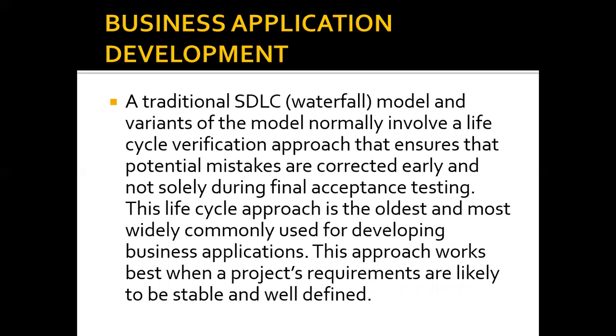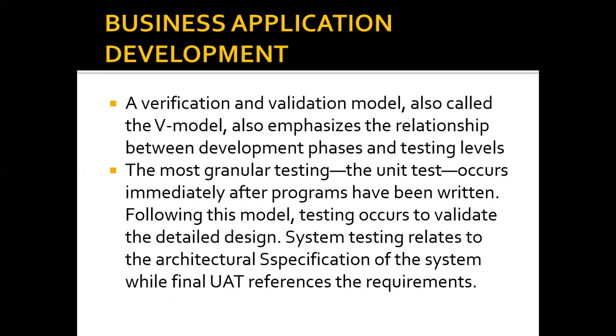All right, so the waterfall model basically is just like the normal waterfall, runs from the top down. So we have 6 stages, starting from project feasibility. From there, we move to requirement definition. From there, we move to design. From there, we move to development. From there, we move to final testing and implementation. And from there, we move to post-implementation. So we finish one stage, we move to the next stage. That is basically what the waterfall model is all about.